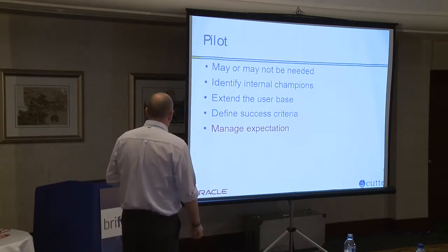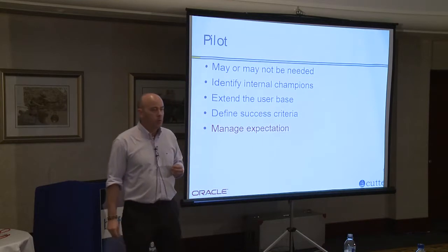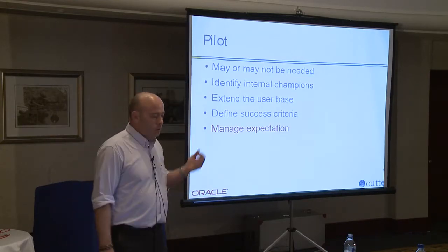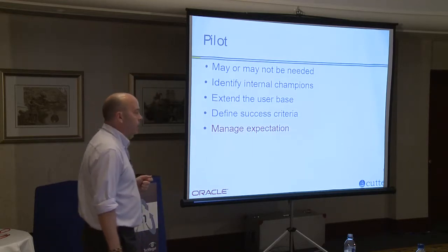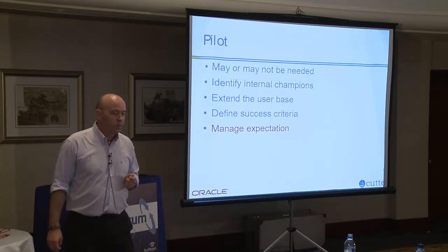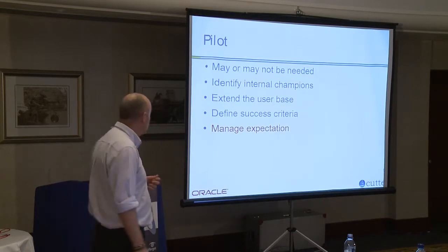Same with the pilot. It may not be needed. It depends on how big the deployment's going to be. Some people are quite happy to jump from proof of concept to deployment. The case study that we're going to go over shortly, they went for a large-scale pilot because the organisation was so big, and then we were looking at putting so many desktops into that environment that a pilot needed to be carried out. The proof of concept wasn't going to be enough.